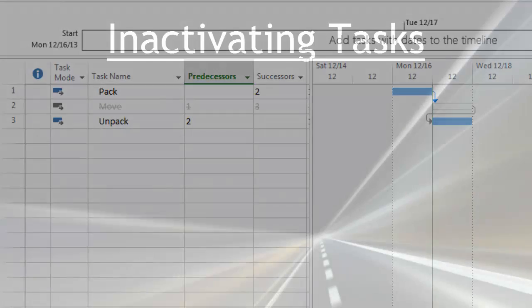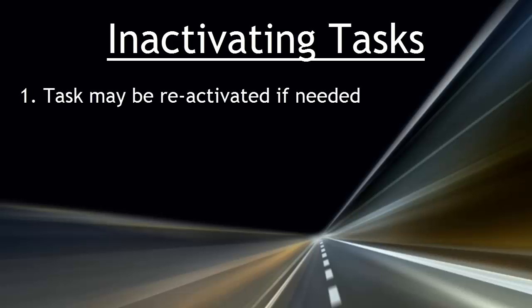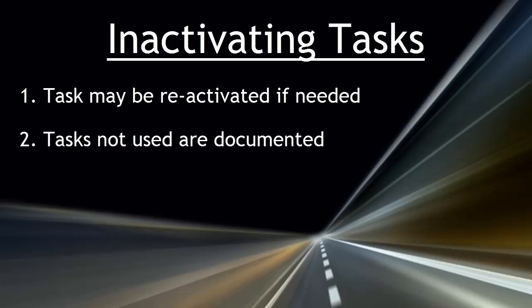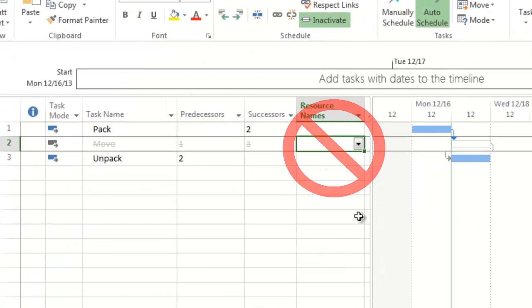There are 3 advantages to inactivating tasks as opposed to deleting them. 1. The task may be reactivated if needed. 2. Tasks not used are documented. And 3. Schedule logic is preserved. An important note: project managers should not assign resources to inactive tasks.